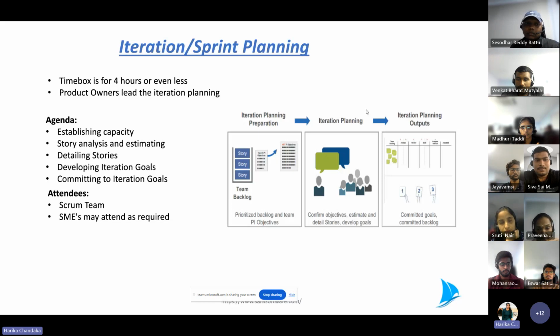So in Jira, we usually have stories in the backlog created by product owners, and we will read out each story to ensure the objective of what we are going to achieve through the story is clear to each and every team member, and we will leave the story estimation to the development team. So the development team will be giving their estimates.